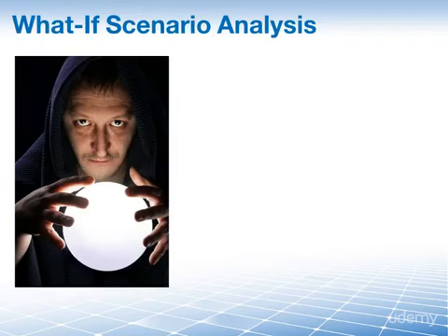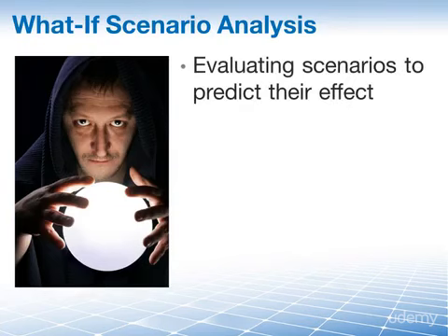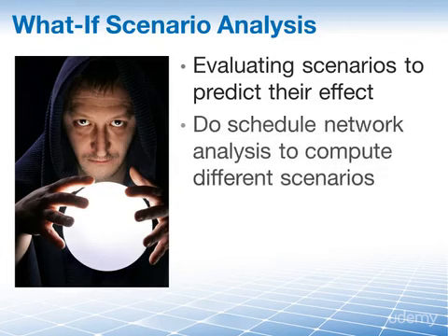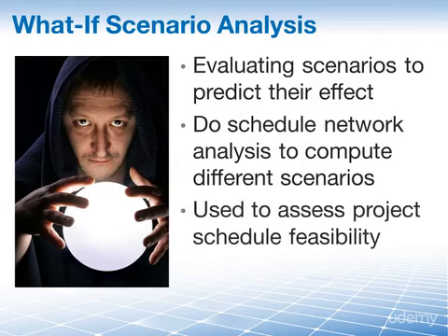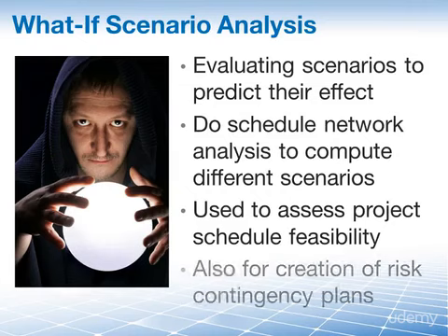So the what-if scenario analysis is the process of evaluating scenarios in order to predict their effect, positive or negative, on your project. A schedule network analysis is performed to compute the different scenarios. The outcome of performing this scenario can often be used to assess the feasibility of the project schedule under different conditions. This technique can also be used to prepare contingency and response plans to overcome or mitigate the impact of unexpected situations on the project.